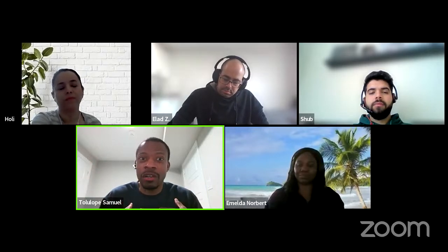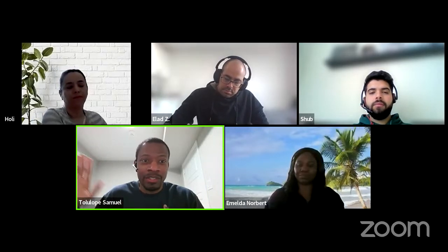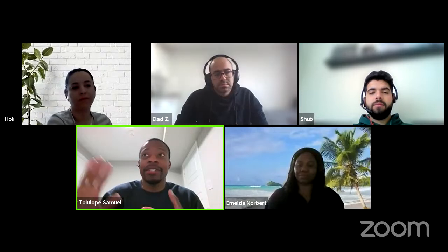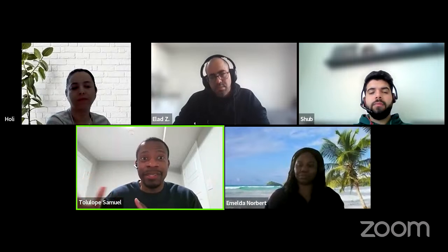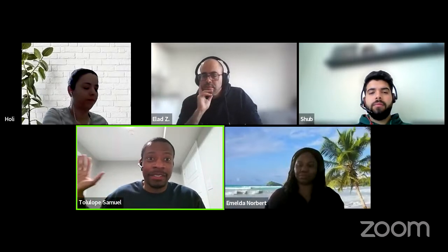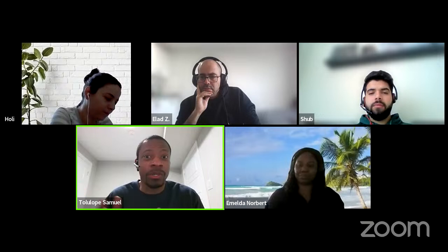At the end of the day, it's not your call, it's their problem. It's your responsibility to take it to them to say, hey guys, this is what we think we've missed. Figure it out and let us know what you want to do. Do you want to put this in scope or do you want to leave it out of scope? Because at the end of the day, if it's going to be in scope and it wasn't originally budgeted for, it's going to cost you more money, right?